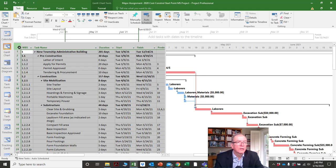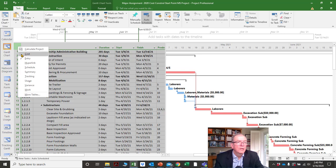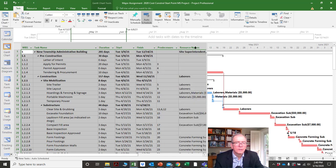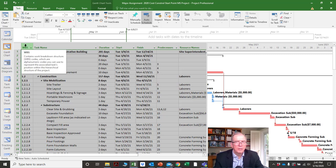And if I want to make sure I'm in the entry view, I can click on that square icon box and confirm I'm in the entry view. The entry view has duration, start, finish, predecessors, and resource names as default columns.